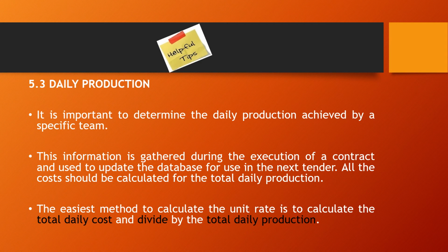Remember, the total cost itself might not change, but what influences the rate a lot is your total daily production. If your team is very sharp and quick and they know what they are doing, you are going to make more money because now you are having a better output.